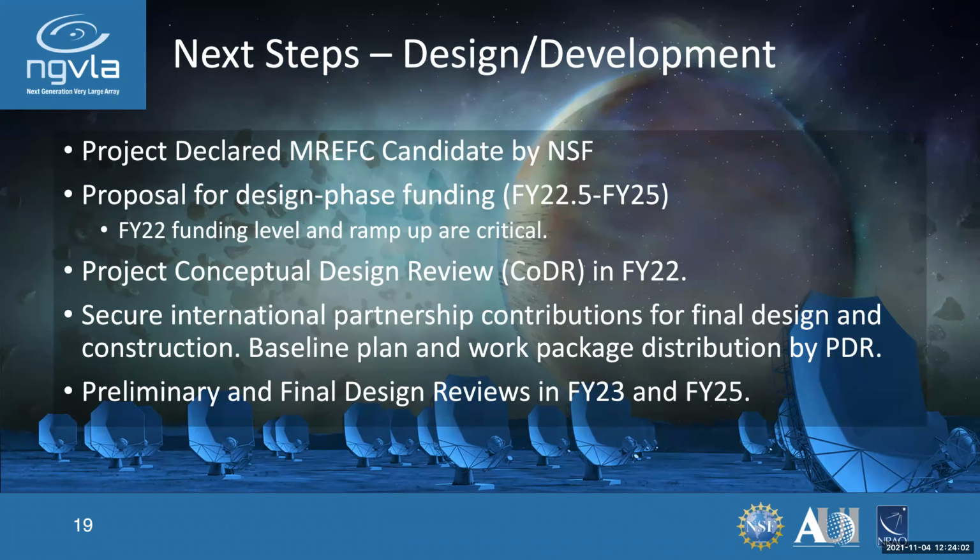So this is the second to last slide, I'll go through it quickly. We really want to be declared an MREFC candidate by NSF. We have about 4 years of design and development work to be done that we'd like to ramp up. We're working on a CoDR for next year and starting to really secure international partners in the year ahead of our PDR, which should be in FY23. And we want a critical design review to be construction ready in 2025.